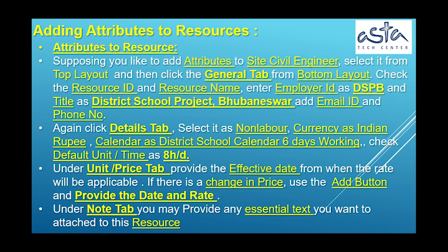Under Unit versus Price tab, provide the effective date from when the rate will be applicable. If there is a change in price, use the Add button and provide the date and rate. Under Note tab, you may provide any essential text you want to attach to this resource.